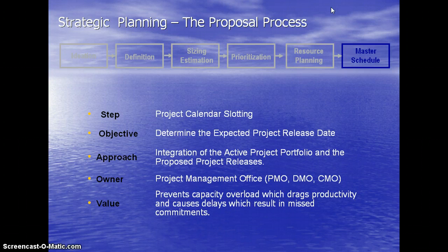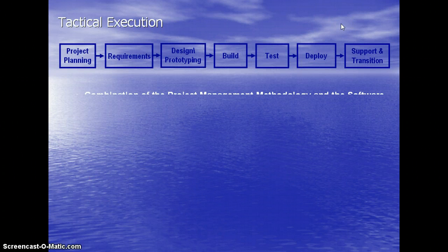As the planned project release date draws near, you would do another quick check of capacity, as you have potentially 3 months of changes, and might postpone based on other projects running late. That concludes the planning and starts the commitment clock running.